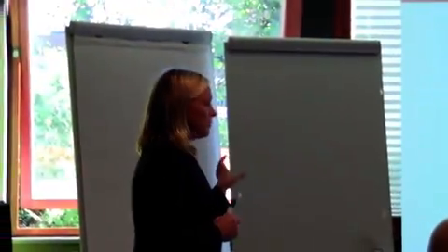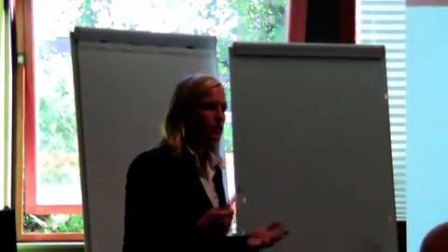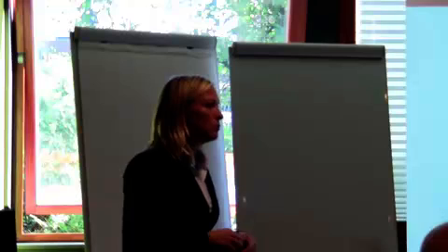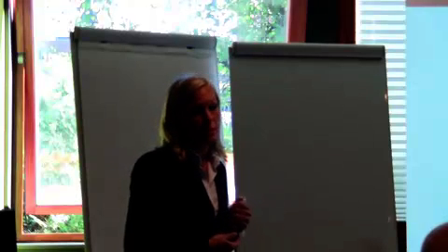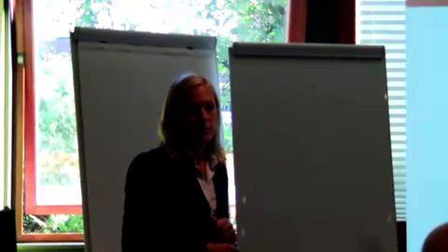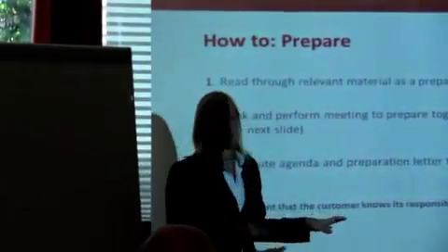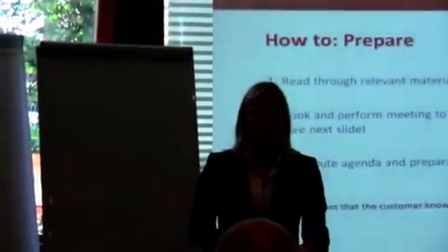And after that is done and all the preparations are decided together, you also distribute the information to the participants with the agenda and the bullets that they should prepare. Also beforehand, at least 2 weeks. And this is very important. Let the customer know what they should have done.